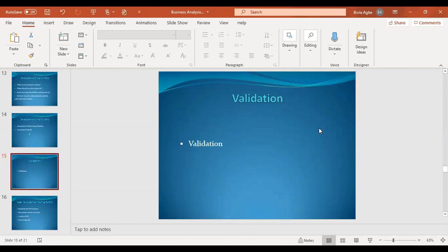maybe down the line, maybe they've even started developing, and then they say, oh, we have a new requirement, that may have to go through change control depending on the manager. And even if there's a new requirement that needs to be added to the previous one you submitted, it will be 1.1. So you have to do the amendments again, 1.1, 1.2, 1.3, till they have to provide a sign off on it again.